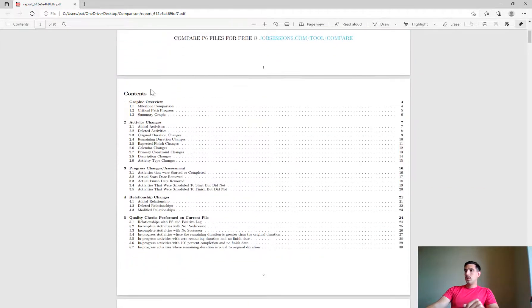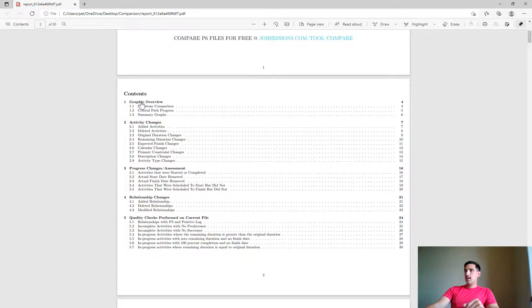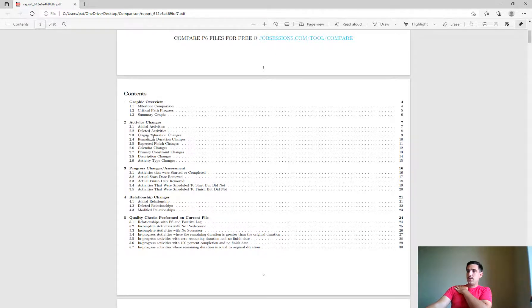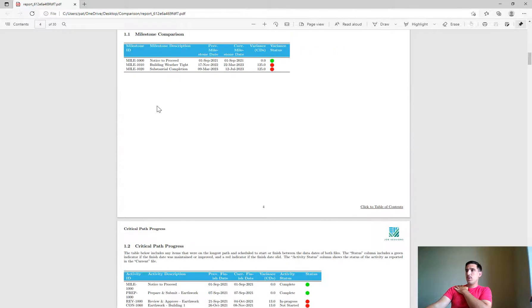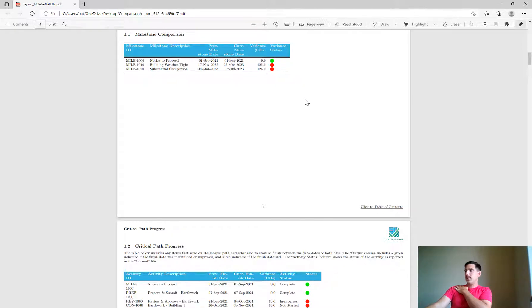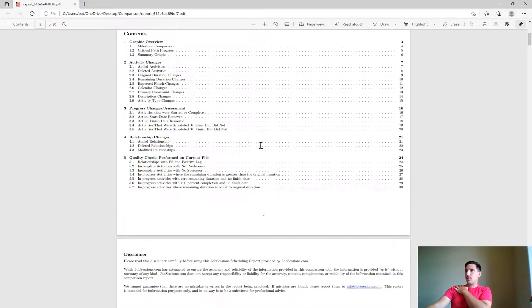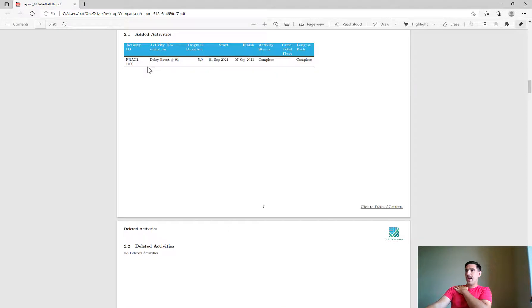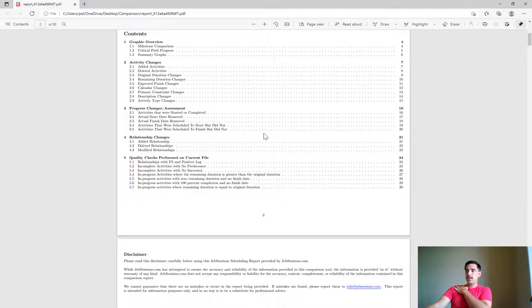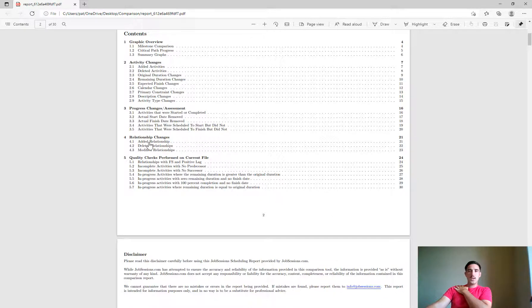Here is the table of contents for everything that got compared. We can see added activities, deleted activities. If you just click on a section of the report it'll jump to that section. So we see here all the milestones in the report, previous milestone date, current, variance, and whether it was a positive or negative variance. We can click back to our table of contents, go to added activities. It's really such a great report, easy to navigate, and shows you all of the changes that have occurred between your two schedule files.